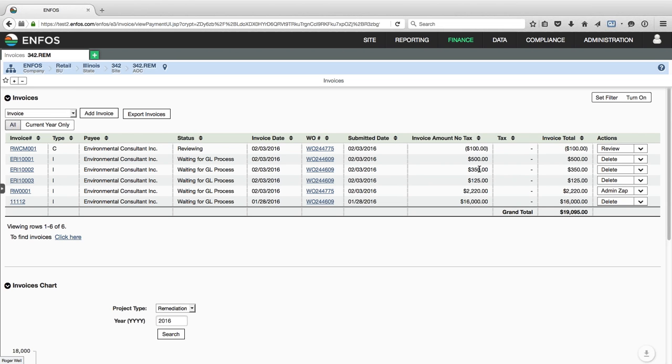But you can lower it. When you do a re-estimate and that goes through for its approval, that money that it was lowered by goes back into the available to commit total for that project plan. So that would be one reason why you might want to do a re-estimate. So it's not really a credit memo on the work order. It's a re-estimate to lower the approved work order amount.